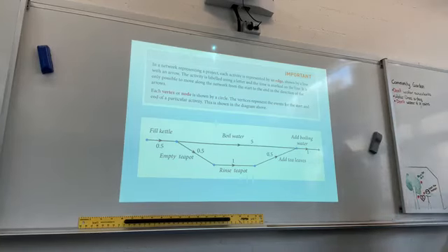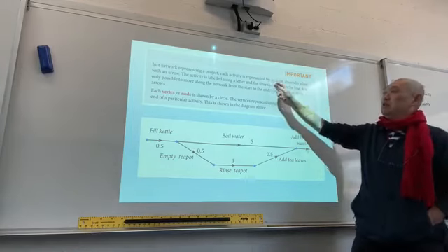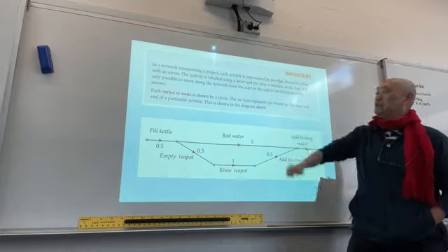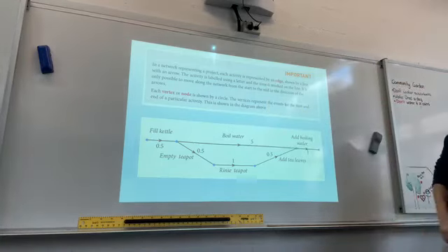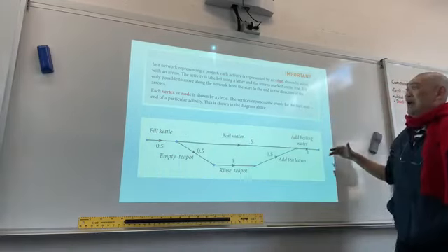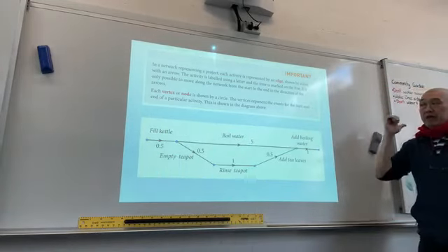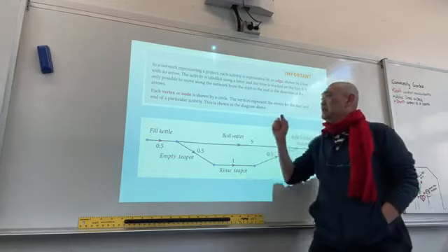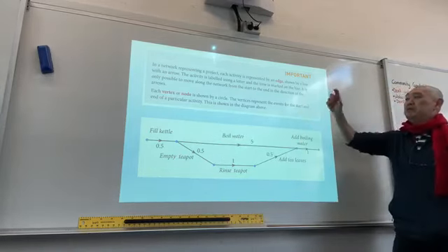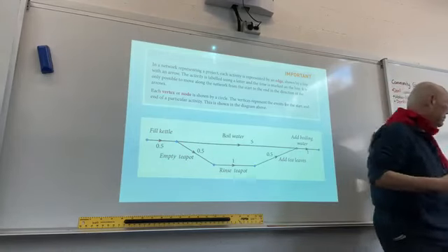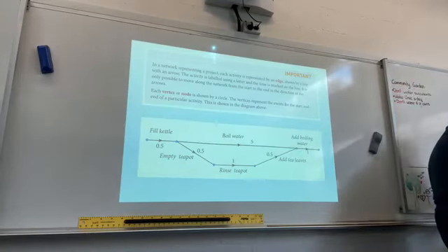All right? So for a project network, each activity is represented by an edge. All right? And labeled using a letter, and the time is marked on the line. And it is possible to move along the network from the start to the end, only in the direction of the arrow. All right? The vertex or the node shown by a circle only represents the event for the start and the end of a particular activity. It's like a connection point.